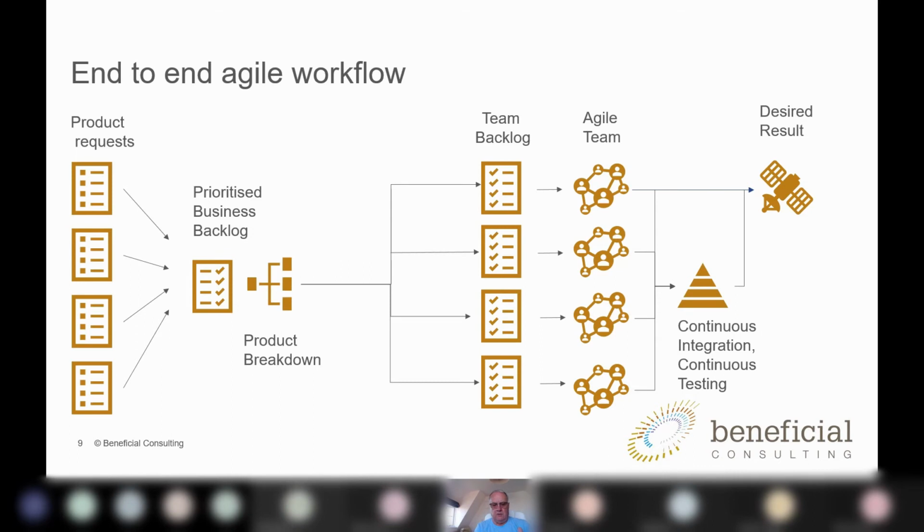Okay, so parking that for a minute. What I've done is I've explored the size of the team. Maybe we can be more flexible with the size of the team. I've explored whether we can have a secondary team and a primary team and how that could work. You might want to think about how the team identifies when they're going to need specialists, because if they're working on 2-week sprints, you might want to think about the requirements for specialists in the next sprint, the next but one and the one after that, in order to give those specialists enough diary time to actually be available when the squad needs them.